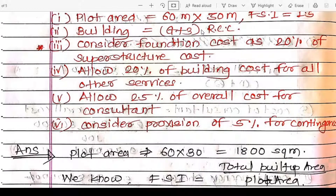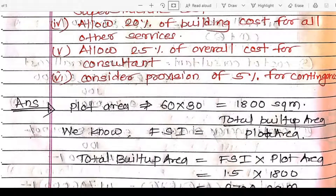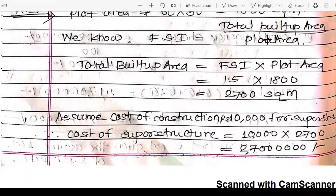The plot area is 60 × 30 = 1,800 square meters. FSI (floor space index) is defined as total built-up area divided by plot area. Therefore, total built-up area = FSI × plot area = 1.5 × 1,800 = 2,700 square meters. The building is located in the western suburb of Mumbai, so we assume a construction cost of rupees 10,000 per square meter for the superstructure.